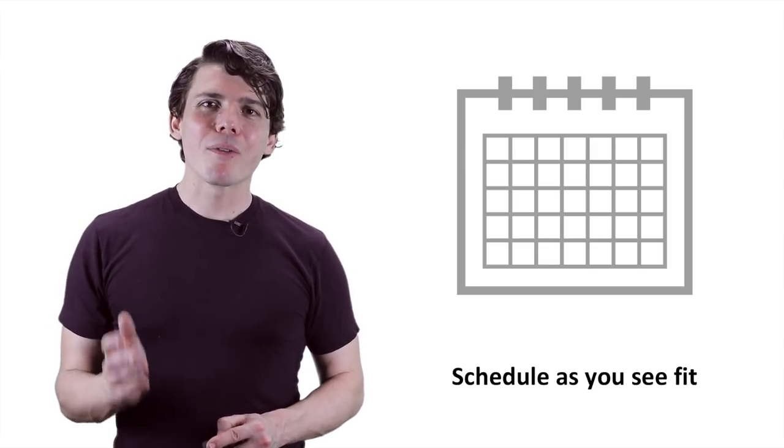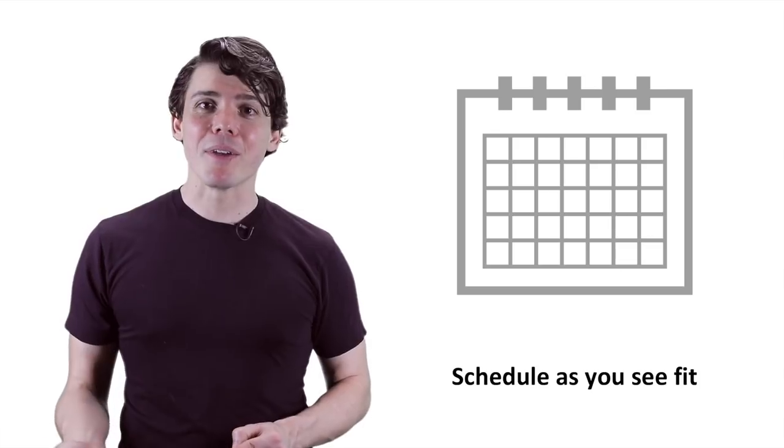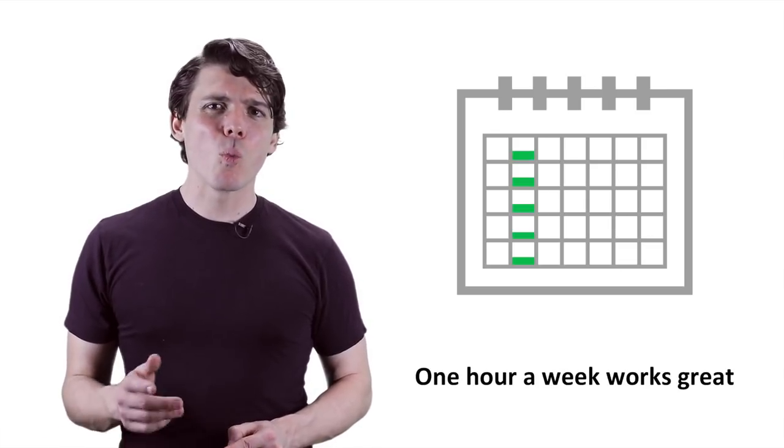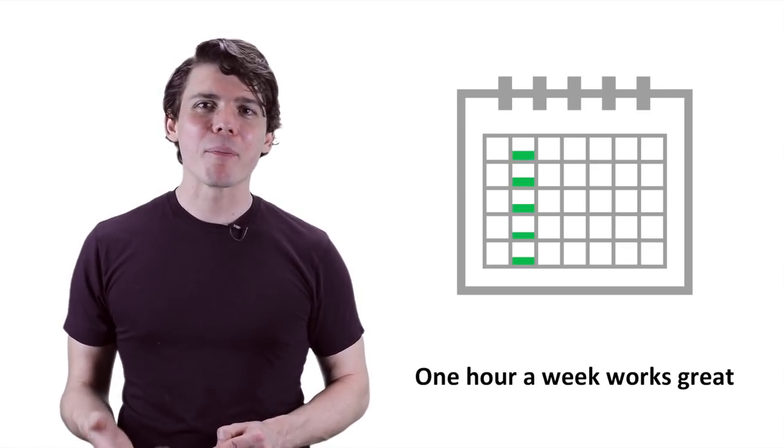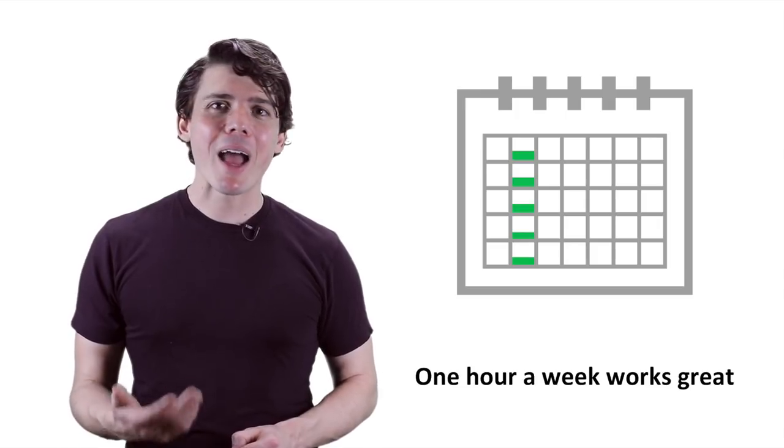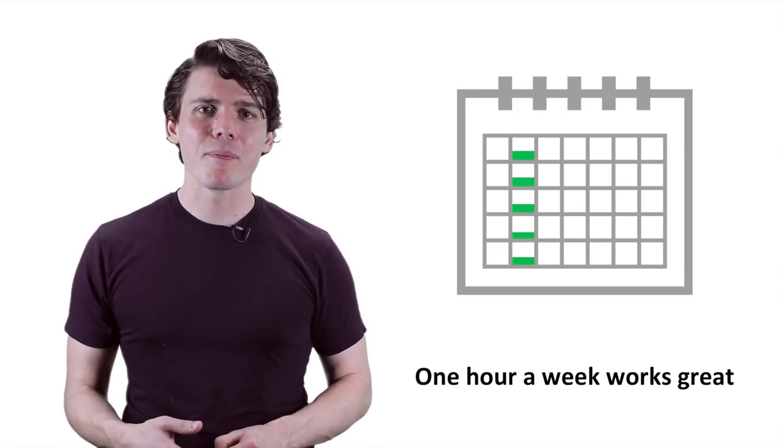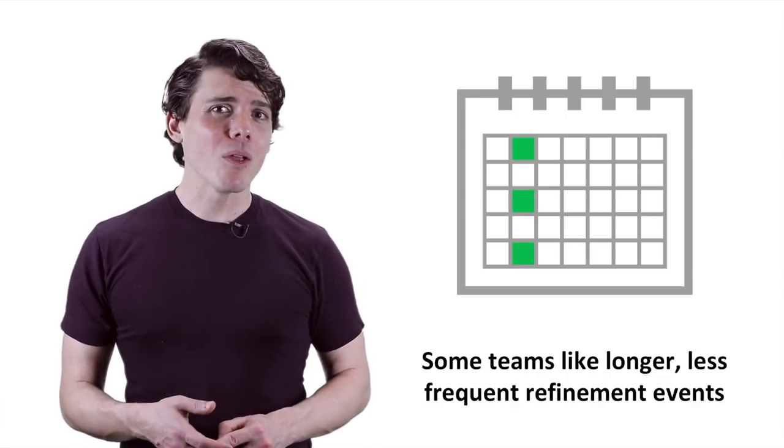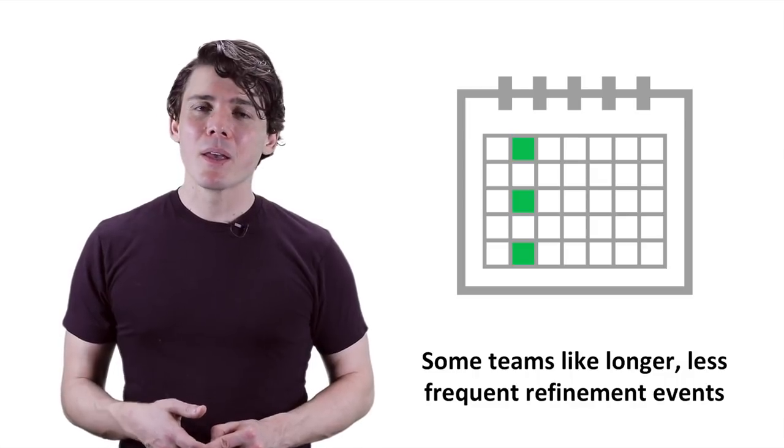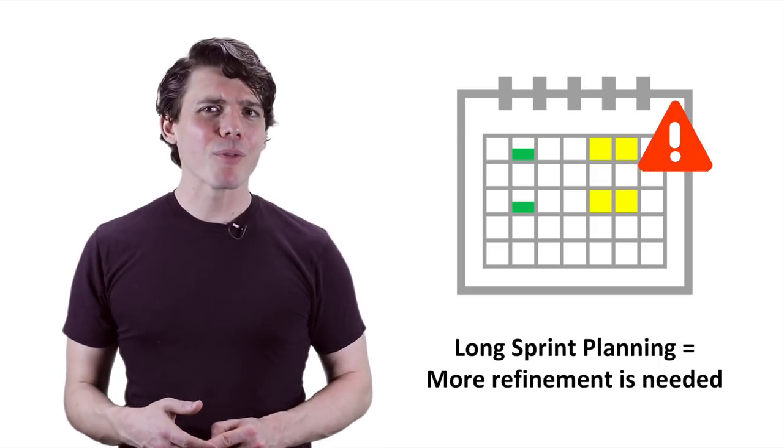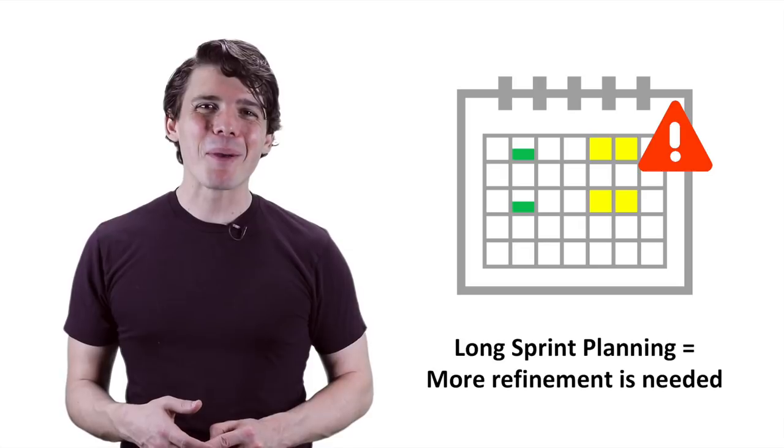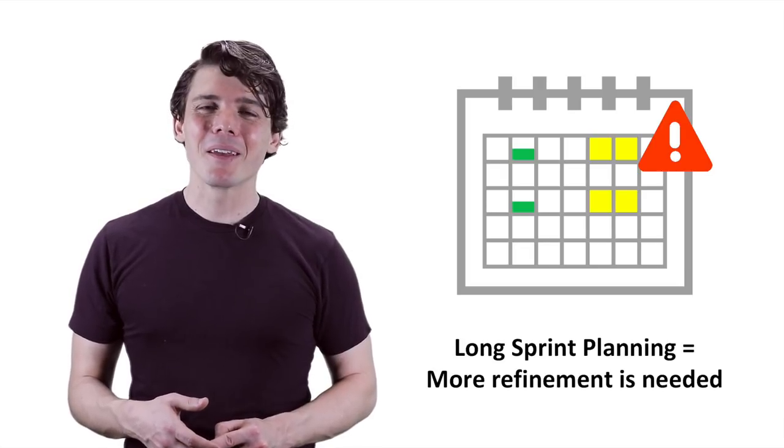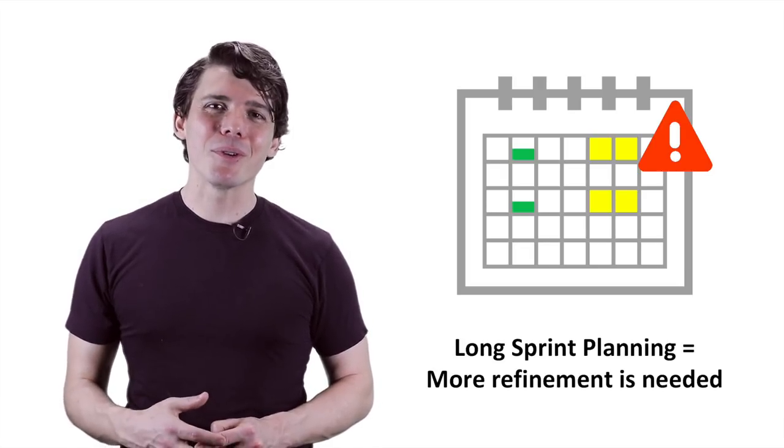Schedule your backlog refinement events as your team sees fit. I generally suggest one shorter backlog refinement event per week, lasting about an hour for mature teams and products. Some teams like one longer session per sprint. If your sprint planning events seem to take forever, you probably need to spend more time doing refinement. This is especially common for new teams or products.